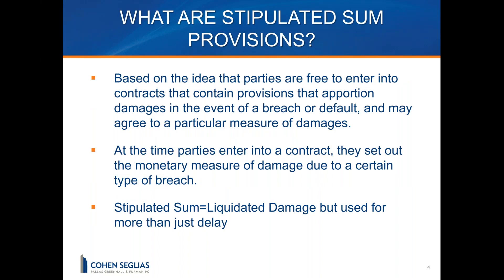So to begin, what are stipulated sum provisions? I'm going to use 'stipulated sum' interchangeably with 'liquidated damages.' In the construction industry, everybody thinks of liquidated damages as only something that happens if a project finishes late, but it can be more general. The idea is that the parties are free to enter into contracts that contain provisions apportioning damages in the event of a breach or default, and they may agree to a particular measure of damage. At the time the parties enter a contract, they essentially agree on what the monetary measure of that damage is — if this event occurs, the damage will be measured as X.